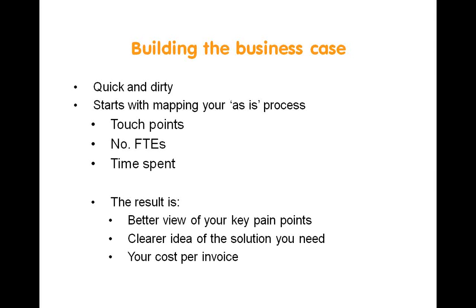So when organizations put together a business case for e-invoicing, they'll normally start with a quick and dirty business case on the back of a beer mat or a fag packet, and it would just be a very, very high level business case. And that's normally how many people do we have in accounts payable, how much are we paying them, and how many invoices do we process. You do a very quick sum to realise it's costing you £2 to £20 to process a paper invoice today. And that should be enough for you to realise, okay, let's look into this. There might be something there in terms of putting together a proper business case and going ahead with e-invoicing.